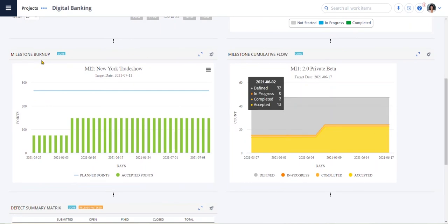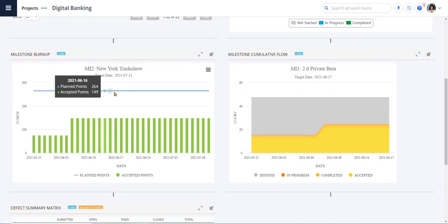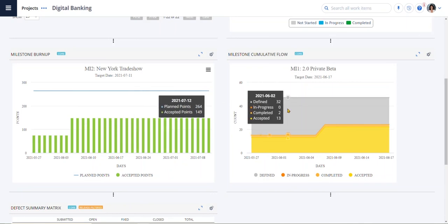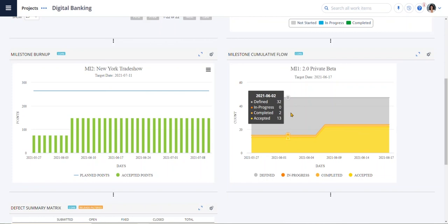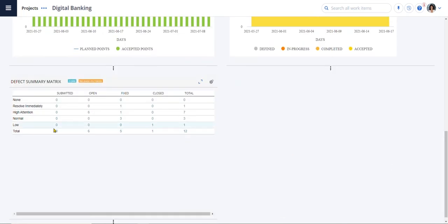The PI throughput on the right shows me how much work is being done across releases. On the bottom, milestone burn-up shows how many points have been accepted versus the plan and the milestone cumulative flow helps improve predictability and shows how many stories have been accepted, completed, or still in progress compared to the total number defined. And we also have a view into our defects.